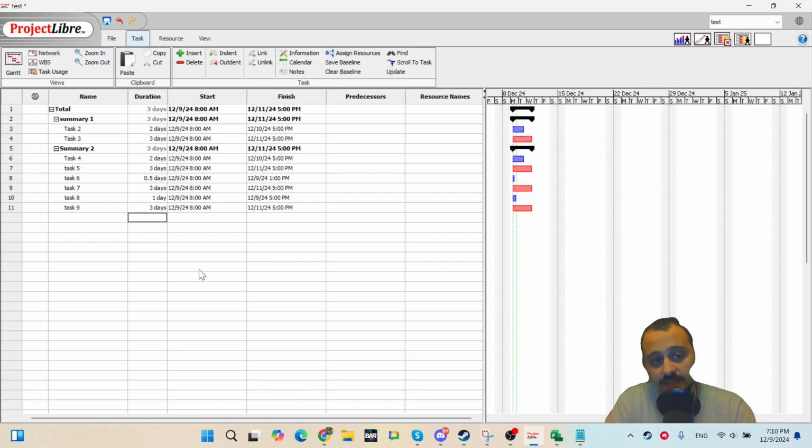The 3 days that it converted to means 3 days, each day 8 hours, and after 8 hours, for example 8 a.m. to 5 p.m., you go rest and continue the next morning at 8 a.m. This is not e-days. I'm not sure, but most probably this is a misunderstanding.